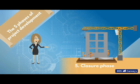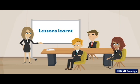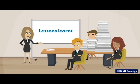Lastly, the closure phase. When all the project work is done, the project manager still has some final tasks to do to formally complete the project. They must hand the project over to whomever it was designed for, the sponsor must officially approve and sign off the project, confirming the agreed objective has been achieved. Then, the project team, the stakeholders, and the project manager sit and discuss the lessons learned. What went well, what didn't, and what could be improved for future projects.